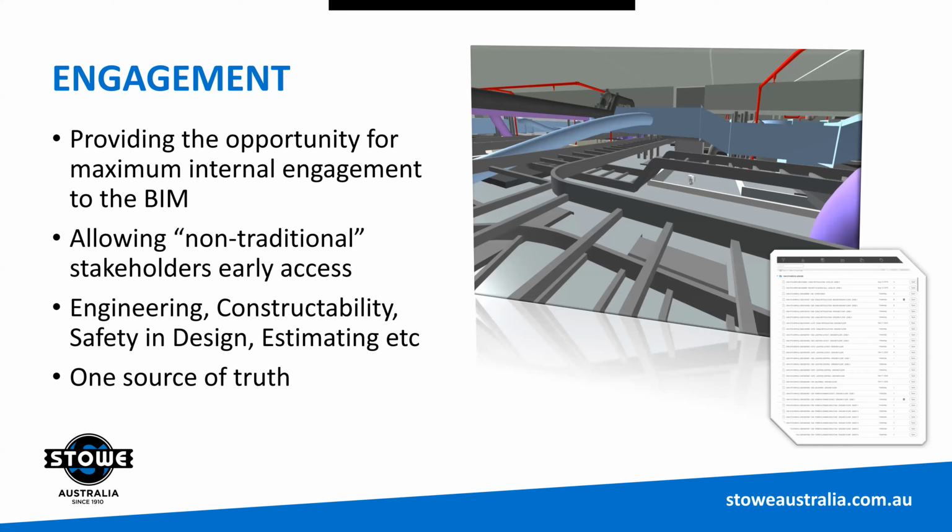For our engagement, providing the opportunity for all our stakeholders to engage with our BIM models, and not just our project managers, engineering, and modeling teams, but providing earlier access to our virtual construct allows us to capture the lessons learned and constructability advice from our supervisors, leading hands, tradesmen, apprentices, etc., at a time when the design can economically accommodate.